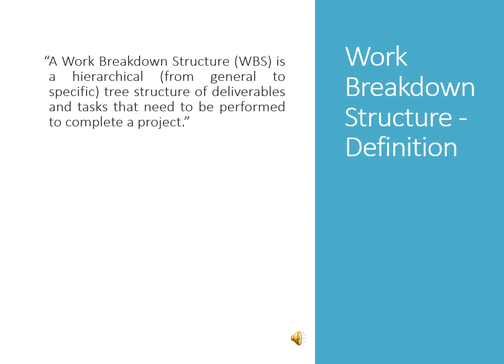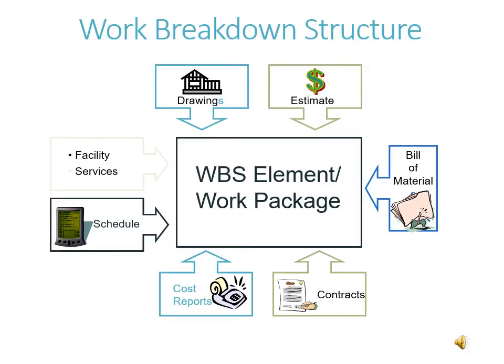A work breakdown structure is a hierarchical tree structure, starting from general to specific, of deliverables and tasks that need to be performed to complete a project. We can see the elements of a work breakdown structure, starting with drawings, estimate, bill of material, contracts, cost reports, schedule, and facility services, amongst others.